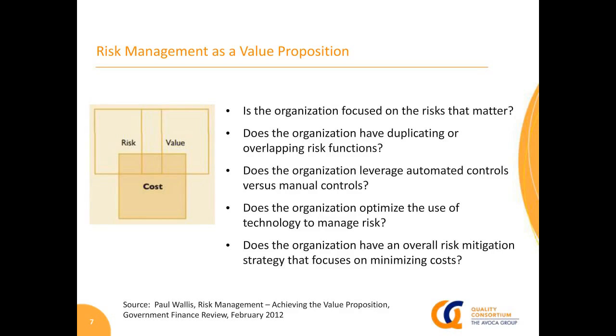However, if the value proposition is considered, let's say again that's a pivotal registration trial that's critical path, if that enrollment is delayed significantly enough such that it delays the market authorization application being submitted to an agency and thereby affects the approval of a product and the launch of a product, the value proposition was not just the cost of added resources to do enrollment. The value proposition includes the lost revenue that was really the more significant factor.